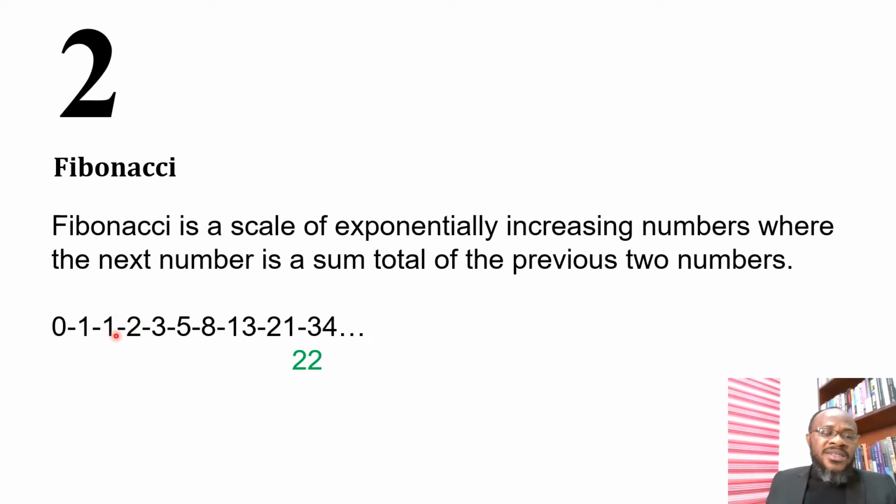So when you assign 1 representing the complexity in a particular user story and assign 2 representing the complexity in another user story, people will perceive that user story as having complexities twice the size of the other user story. That is how they will perceive it. Twice the size, twice as complex as the other user story.